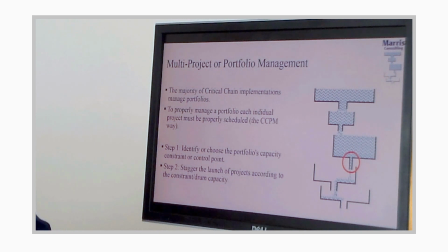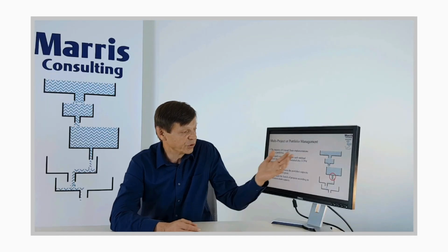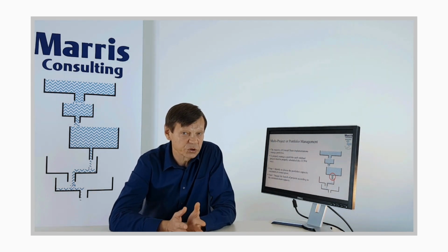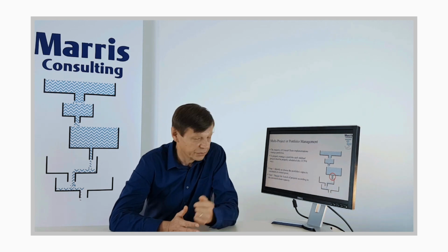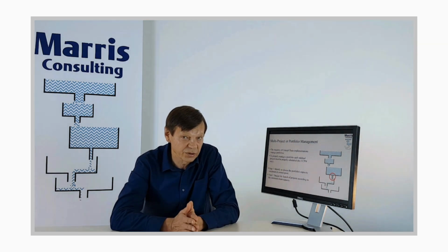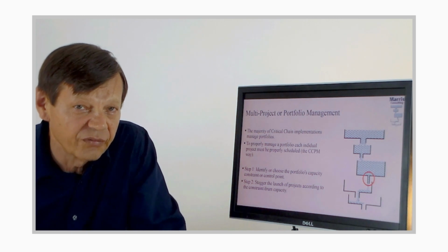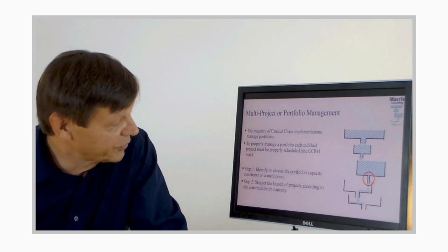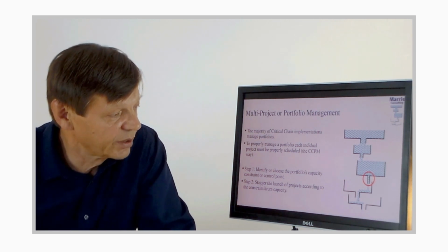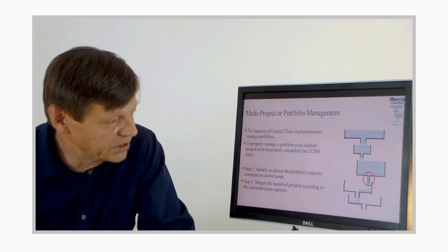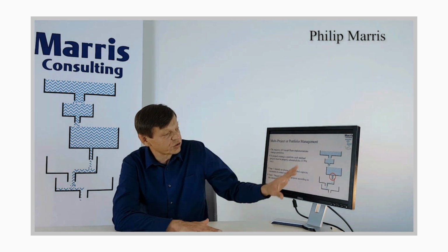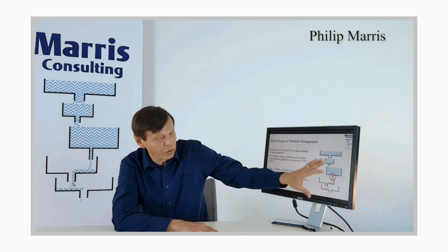The theory of constraints says that you have not managed, this is impossible, to distribute the work equitably, and so somewhere in that system there is a constraint. There's a resource which has overload compared to everybody else, and so the first step is to identify that capacity constraint. You can look at our videos specifically on that subject about identifying constraints in project environments. It can be difficult because of lack of good, rigorous, pertinent data, and for many other reasons. And indeed, it might not even exist as such, in which case you need to choose within the system where the control point is.